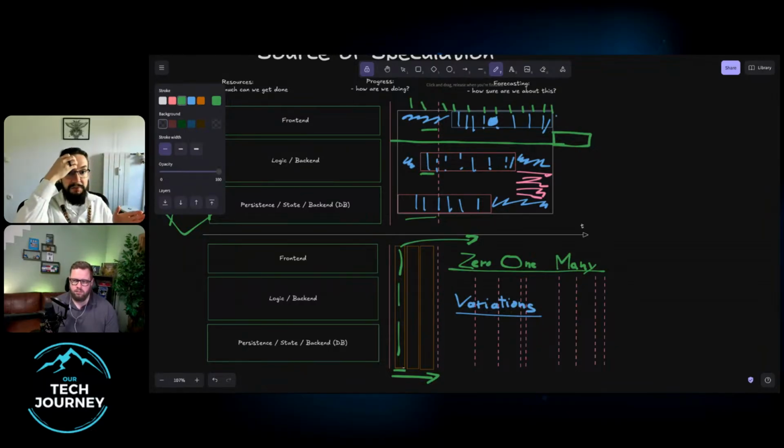And that mentality helps a lot with vertical slicing, because you can then go to that person and ask, hey, I know what I need to do. What do you need to do? And then negotiate how the rollout happens. What can you do today? And what can I do today? And what does us working together look like? If we work alongside, am I bothering you? Are you bothering me? Because then maybe you need to do half of what you usually do, and I need to do half of what I usually do, and we put it together to show everybody that you and I can work together and actually create an increment in one day.